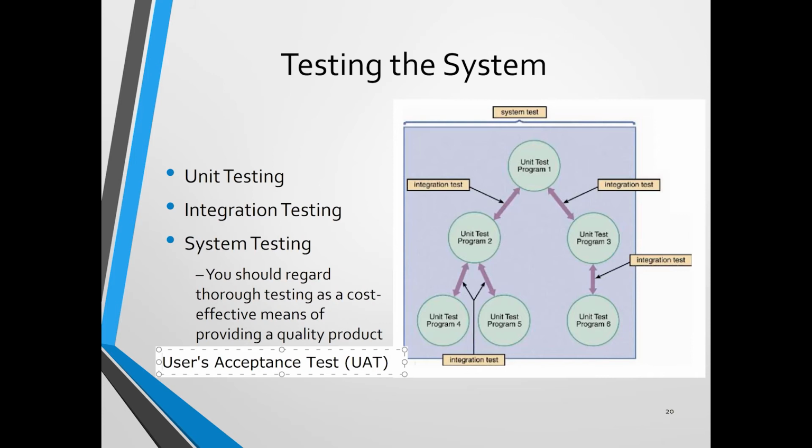How can we test? The user acceptance test will test the system by having a tool that we call test scripts. Test scripts will be prepared by system analysts. What is it? A test script looks similar to a user's manual, but it has some more details for the feedback and comments. For example, I may say that for my test script, number 1, login.